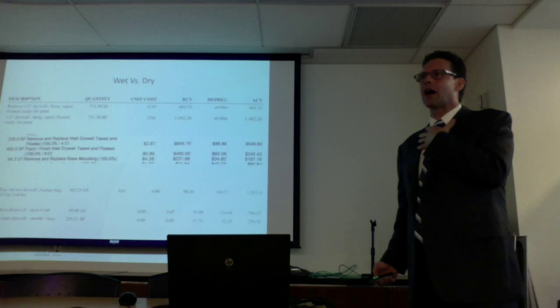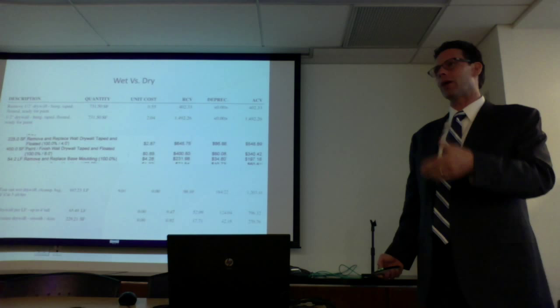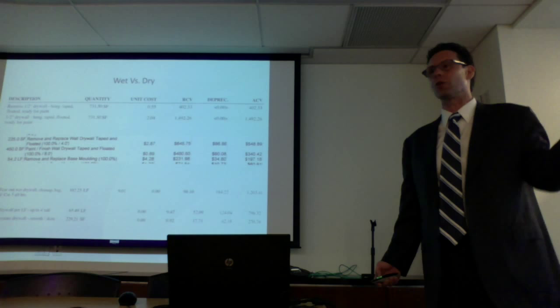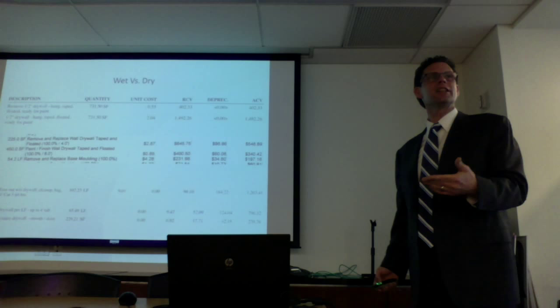At Reliance Restoration, we have our drywall company that delivers, Dubell Lumber, that delivers drywall to us. When I get drywall delivered to a house, I have two guys that show up at whatever time in the morning. They go upstairs if I have a two-story house and they take out a window so I can deliver drywall to the second floor. Or they wait for a truck to come. The guy comes with a boom. He brings the drywall to the door. And these guys load it in. On smaller jobs, I send two guys with a truck to Home Depot or Lowe's or Dubell. They pick up drywall and they come in.